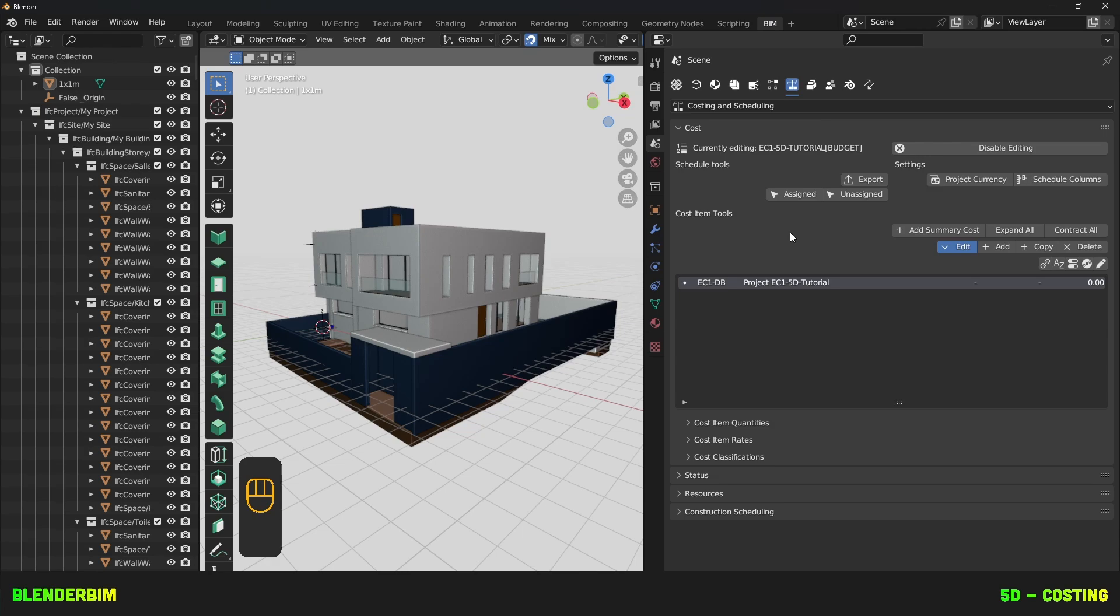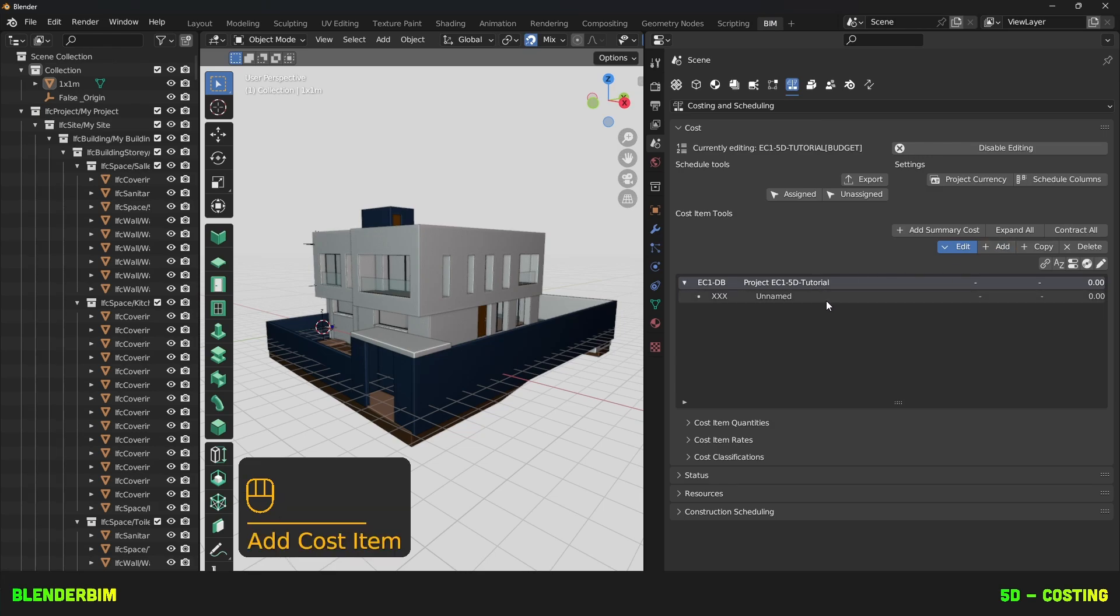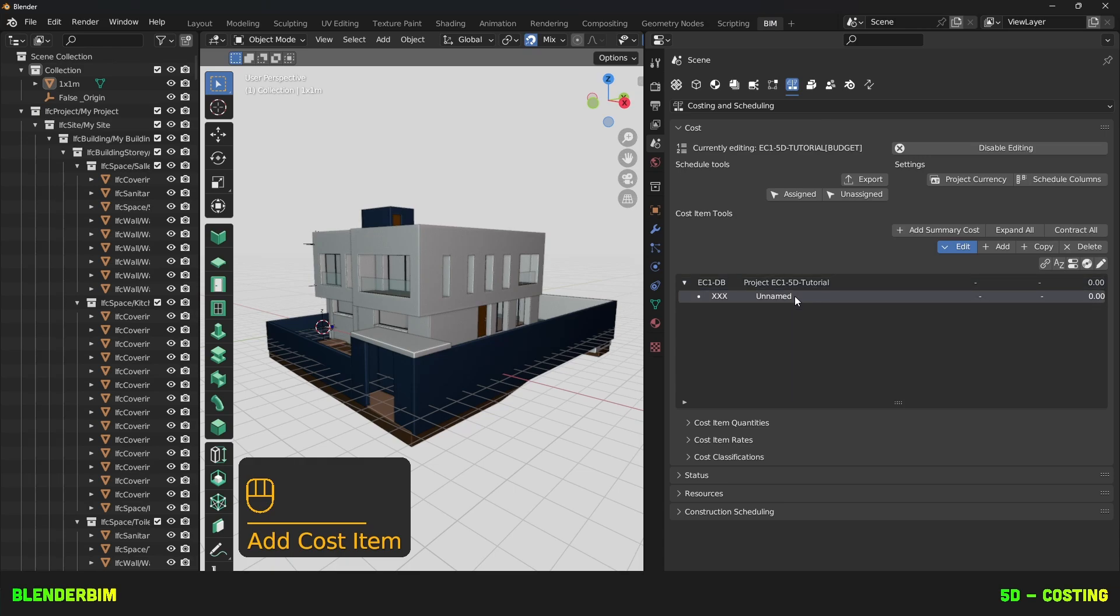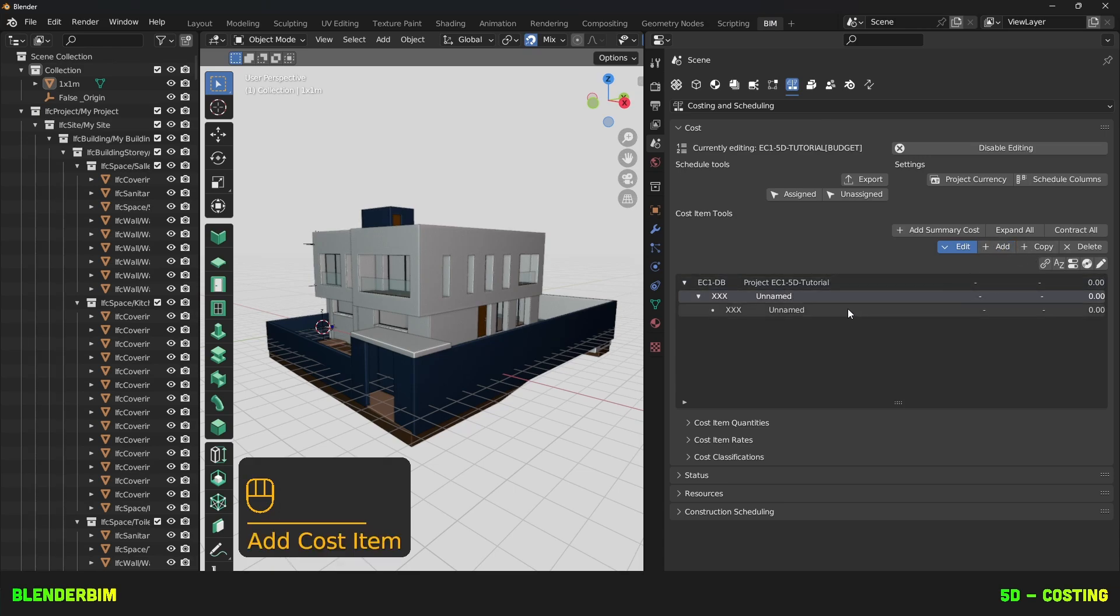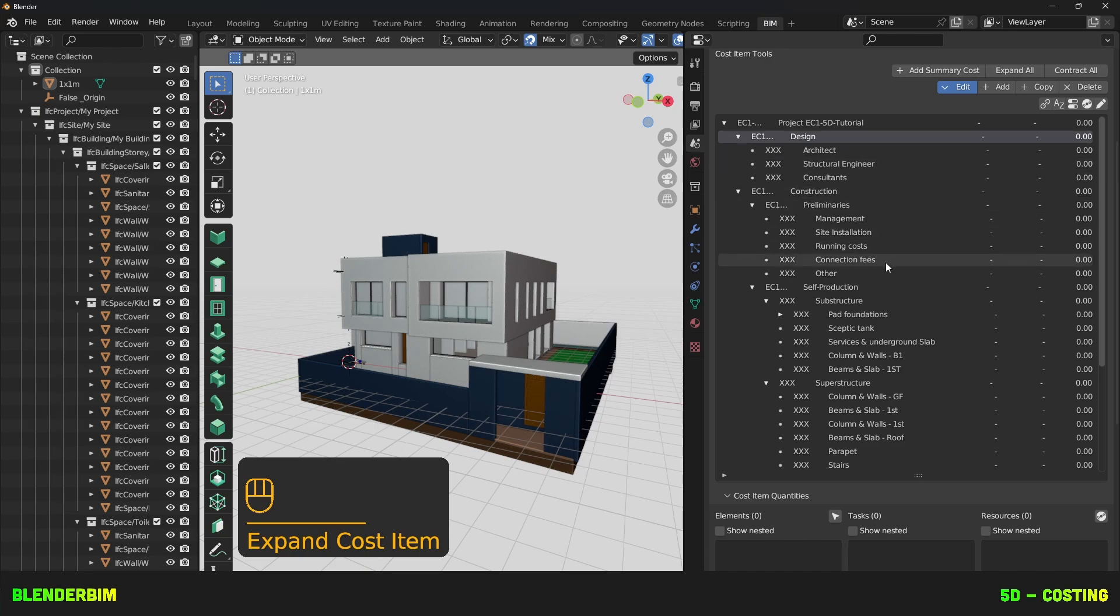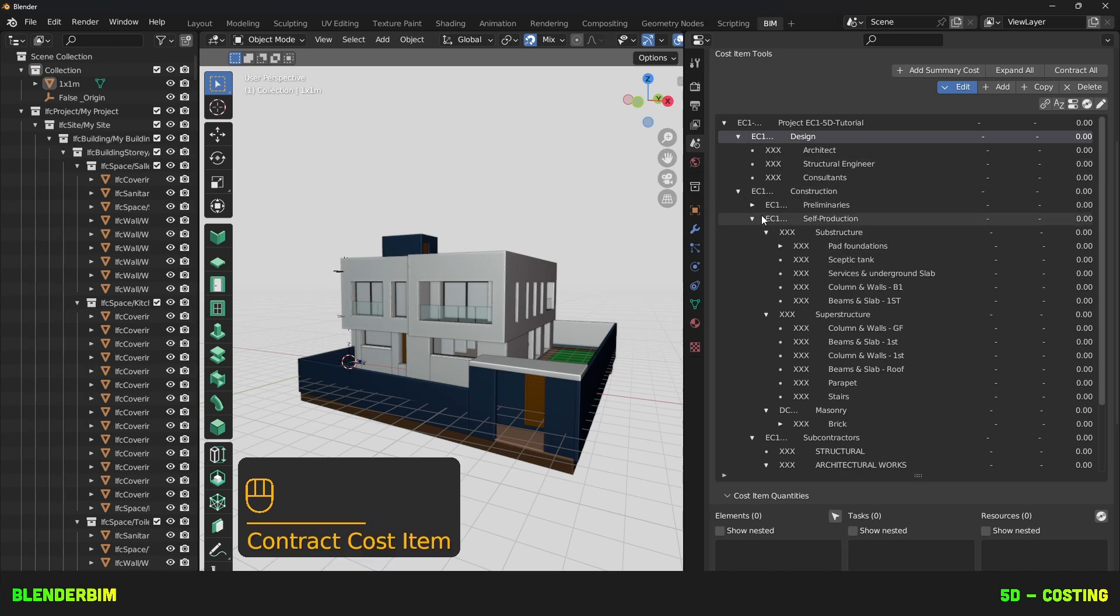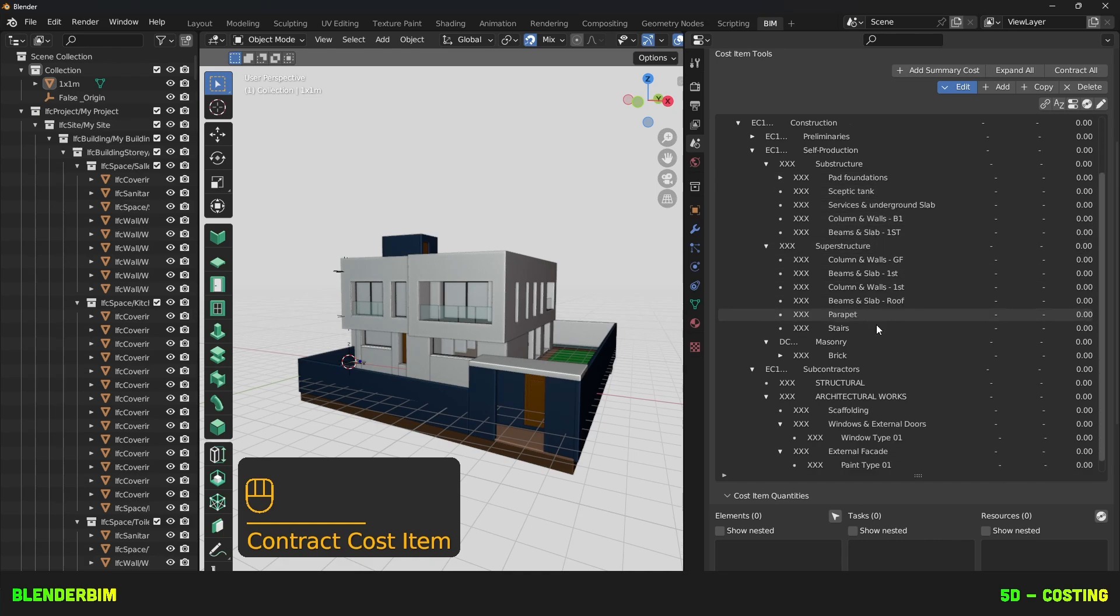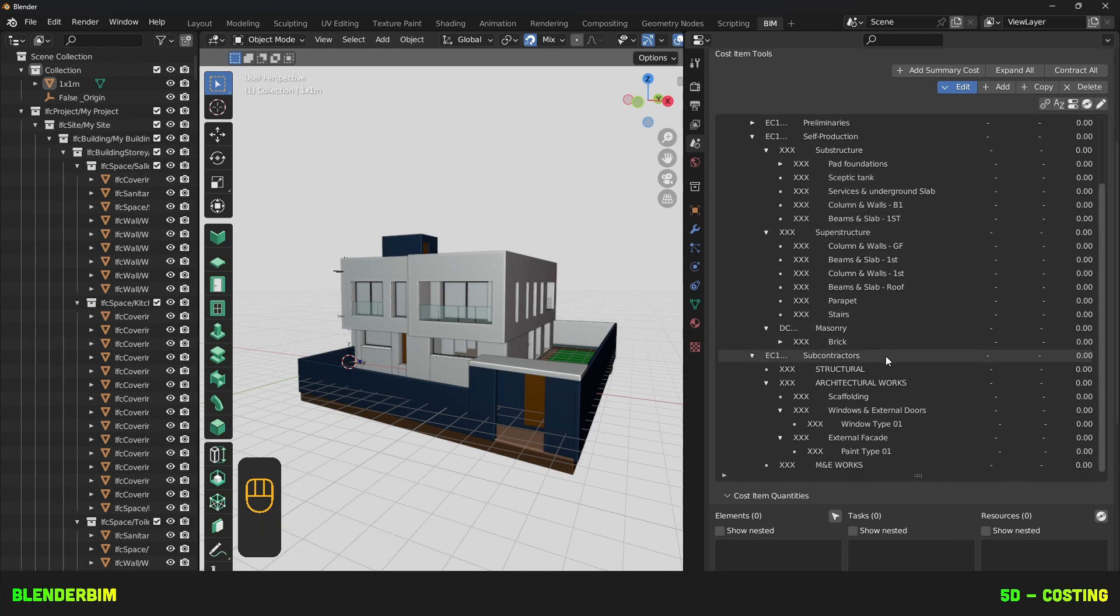We're gonna carry on adding Cost Items in a hierarchy to create a simple Cost Breakdown structure. So, we'll select a Cost Item and we'll press on Add. This will add a Cost Item underneath it. We can then select this Cost Item and press on Add again, and this will start creating a tree for us. I've finished creating my example where we can go into great detail, digging into 4D again, as well as review how to budget costs for subcontractors where we don't need to go into such detail.